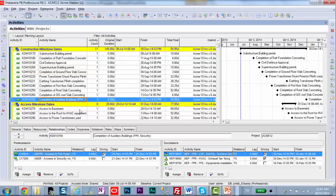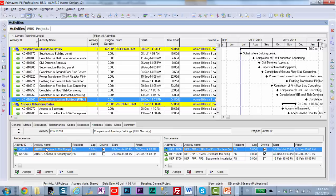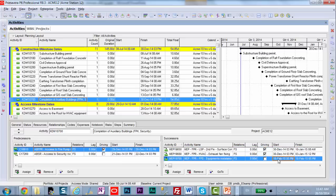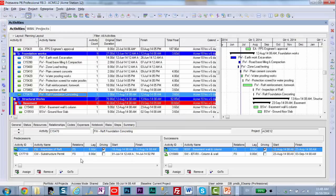Let's do one more. Completion of auxiliary building. Now we're looking at more relationships. So we have a number of incoming predecessors. This driving checkbox indicates that the finish date here of this activity is driving the milestone's finish date. This milestone is also driving two other activities to start. But it's also got a predecessor or a successor here, but it's not a driving relationship. So having that driving relationship and the start and finish date columns there is incredibly helpful to help you understand what's going on.